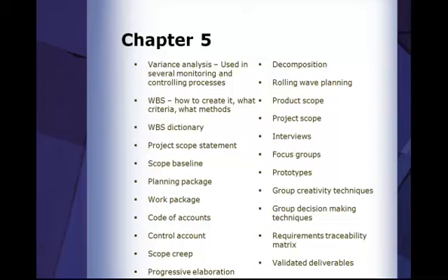Remember, you create the project scope statement based on several inputs. Some of those inputs are going to be given to you, and you're going to work on them and come out with the project scope statement in detail form. Remember also that when you create your WBS, the WBS dictionary, and then the project scope statement, which was an input to that process, will actually give you your scope baseline. Your scope baseline consists of those 3.